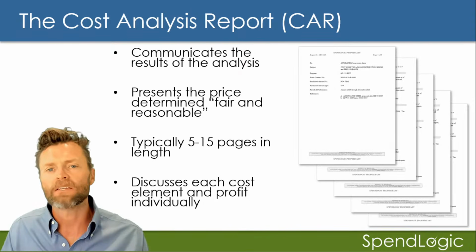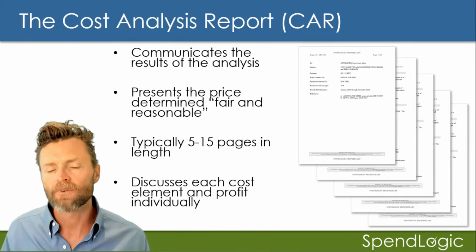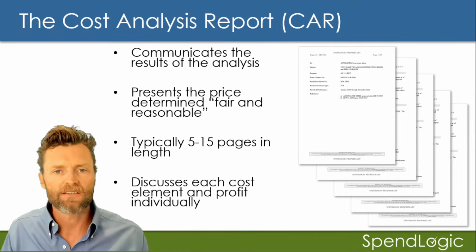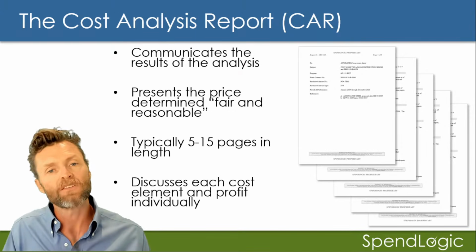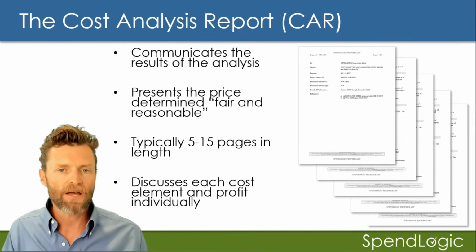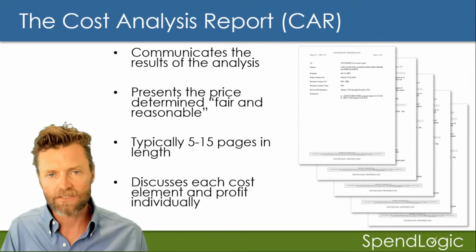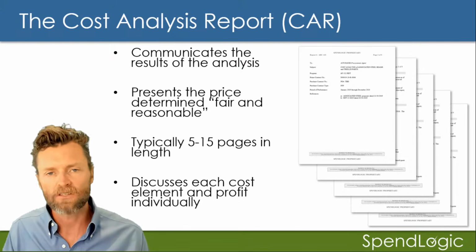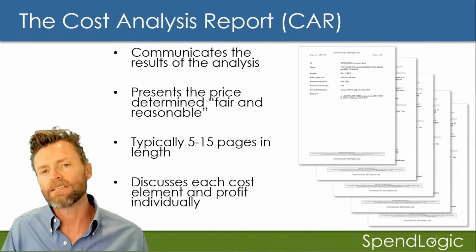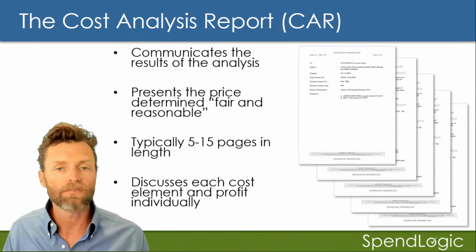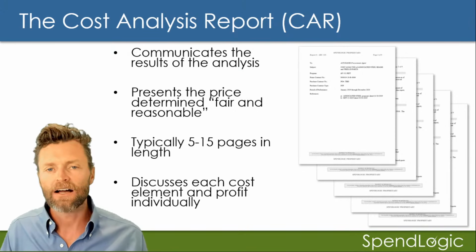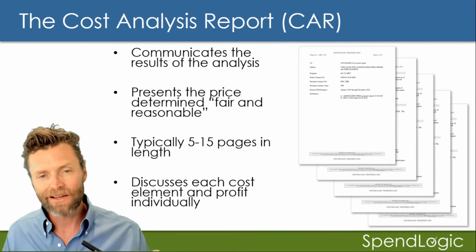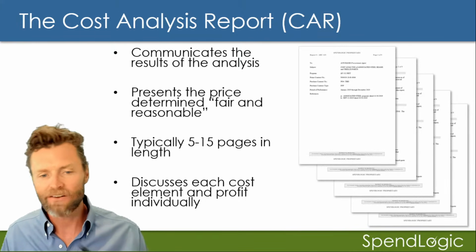But the basic idea is that it explains to a reviewer what your position of fair and reasonable price is. It actually does a couple of things. It explains what the proposal is about and how the proposal came to its determination of fair and reasonable, including the basis of estimates and the information that was included. And then it gets into your analysis position on that proposed position, and then gets into a conclusion. So here's how it was proposed, here's what my analysis is, and here's my conclusion based on all of that.